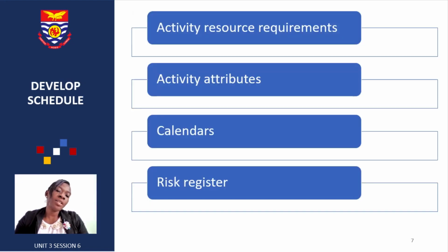So in developing your schedule, obviously there's the need for activity resource requirements. Each activity has resource requirements they would need to be able to undertake that activity. And we said resource leveling can have a significant effect on the type and quantities of the resources which are required. If the resource leveling analysis changes the project resource requirements, then the project resource requirements are updated. So these are things you'd have to be very mindful of and take into consideration.